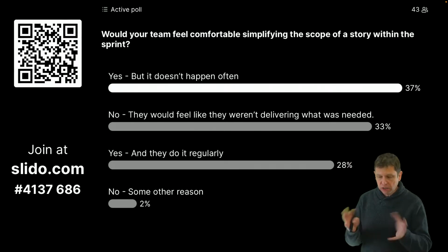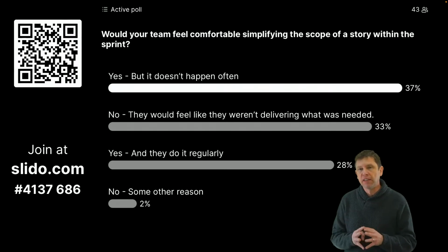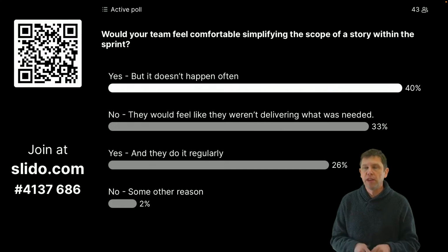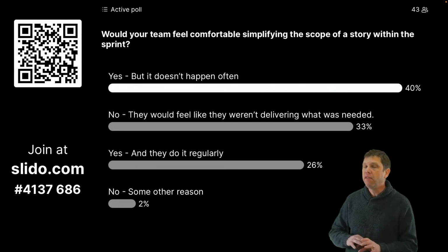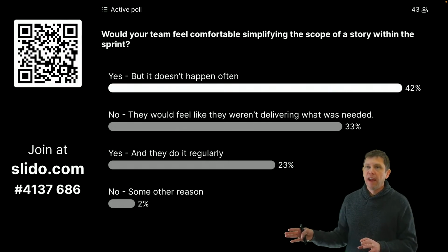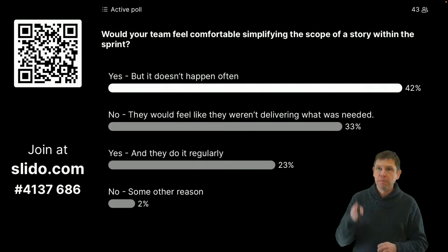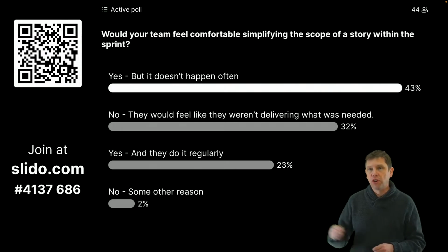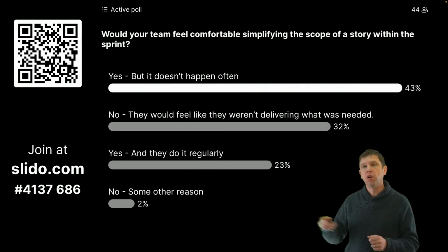Because as we go into working on stories, there are probably some parts of that story. In many cases, there are parts of the story that could be deferred until later, maybe even deferred till after you go live. And if we do that now, it becomes a barrier to going live. If we do it now, it pushes back the go live date.